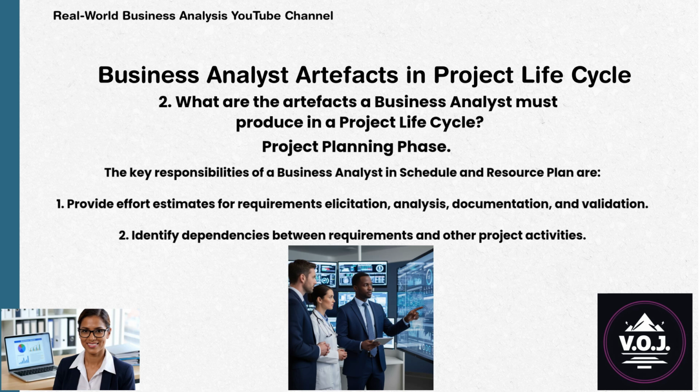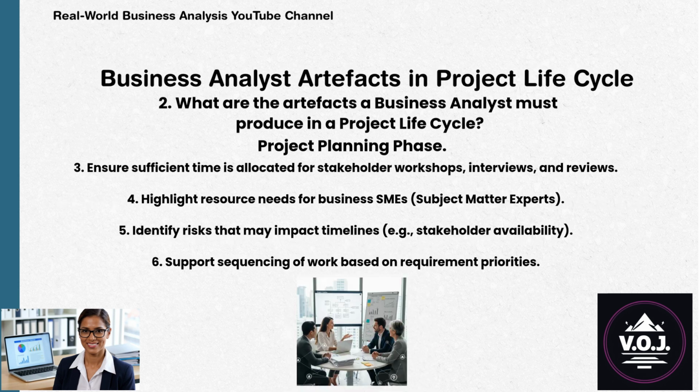The key responsibilities of a business analyst in schedule and resource plan are: 1. Provide effort estimates for requirements elicitation, analysis, documentation, and validation. 2. Identify dependencies between requirements and other project activities. 3. Ensure sufficient time is allocated for stakeholder workshops, interviews, and reviews.